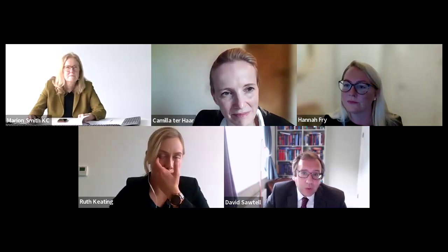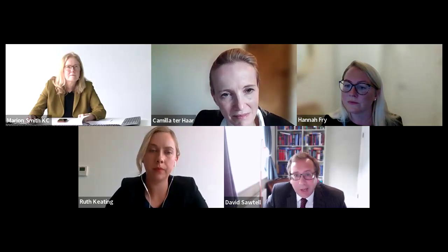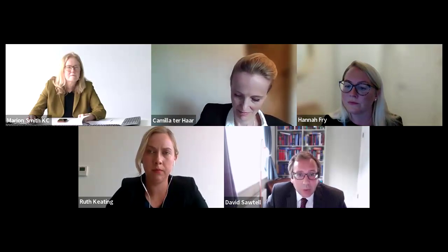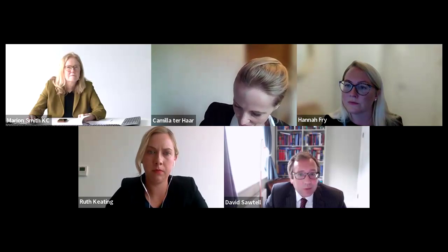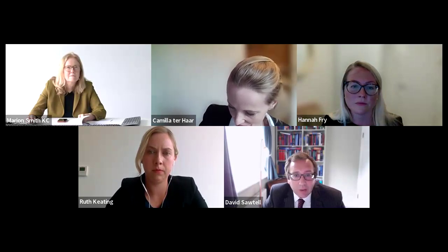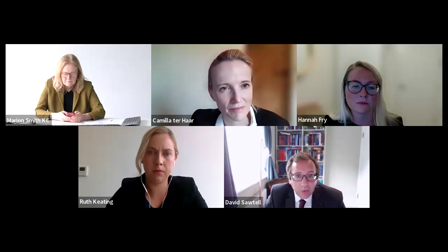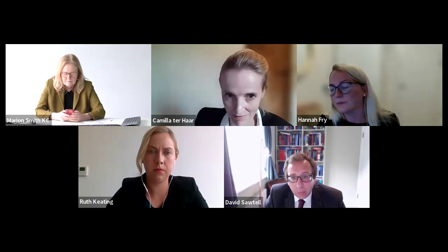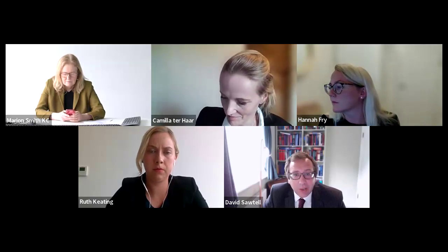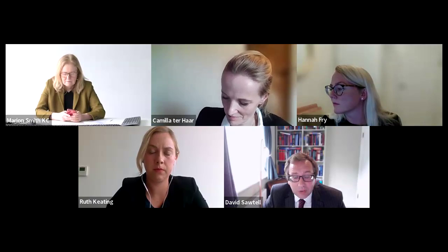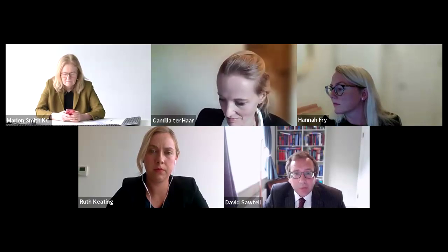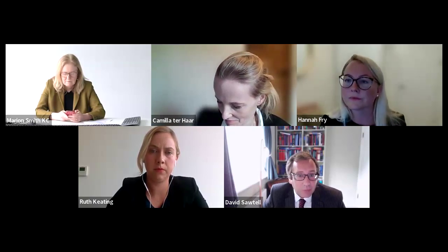Number one, early contractor involvement. As per the Hackett report, try and get all of these issues dealt with earlier rather than having to deal with it during the contract itself. Number two, a clearer allocation of time and money consequences if you want to make changes to improve building performance or because you have to improve building performance. FAC-1, for example, would encourage you to think at an earlier stage about who gets the risk, who gets reward. You're going to have to do this, I think, when you're amending the JCT form from the outset, because it isn't in the standard form.